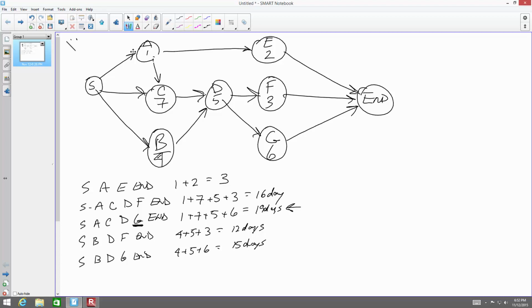In this particular scenario, the contractor's going to receive a one-time lump sum savings or bonus for coming up with this alternative. You're not going to go into a long-term contractual relationship over the life of the project. Even the maintenance may be saved over time, but it gives the opportunity for the engineer to get some of his return for what he's come up with for a good idea.